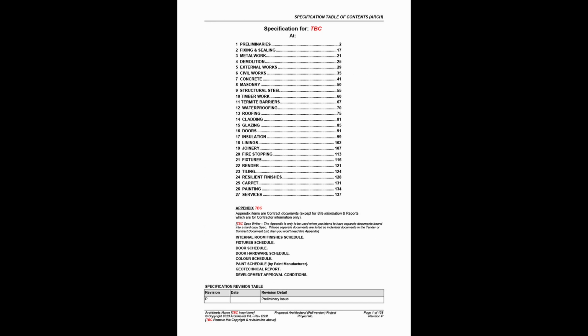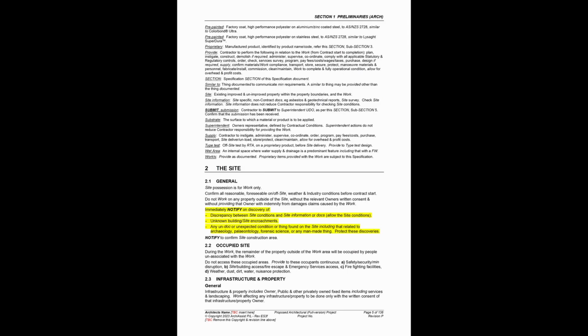The specification aims to be very reliable and safe, closing even little gaps that can lead to on-site disputes. To help achieve this, many defaults exist. These give a direction when a glitch is found, including when spec content conflicts with another document, or when documented site conditions differ from actual site conditions, or when a documented material can't be sourced.